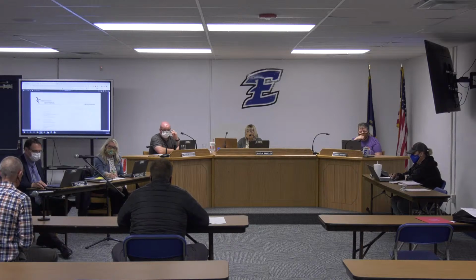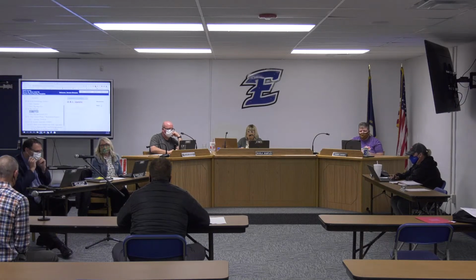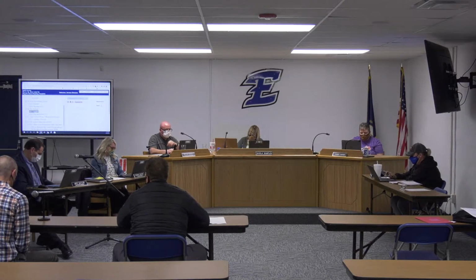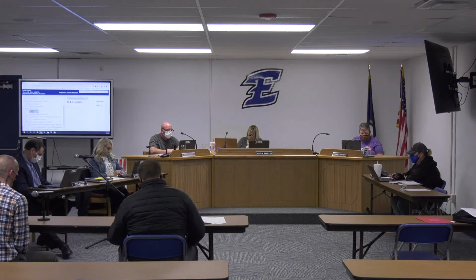Thank you all. There's not nearly as much to let you all know about with the bus garage as there is with the ATC. A lot more activity there, but I was happy to see coming into town today that the fence and the gate have been installed in the last month. That was really good news. There are still a few outstanding change orders that have been requested by the district that we are working through on that particular project. And like I noted last time, probably the contractor is going to need some dry weather to address some site issues in order to get the site up to specification levels.